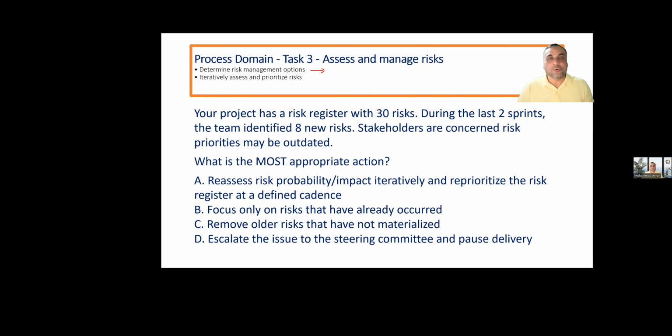Based upon the stakeholder appetite and the stakeholder tolerance, which we also need to set, that is, what is low, what is medium, what is high, we can determine the risk capacity of the stakeholders. We need to set all these things in the risk management plan. Additionally, we establish the roles: who will be the risk owner and who will be the risk action owner.